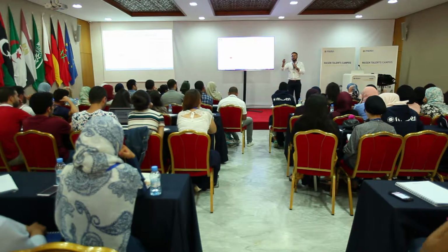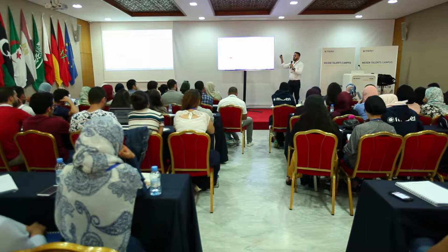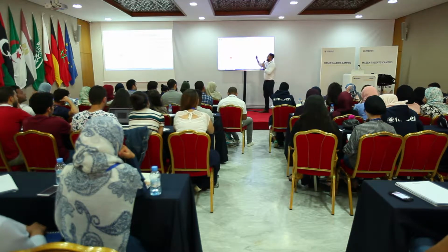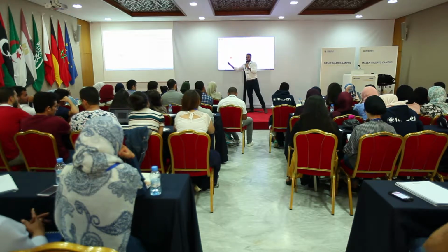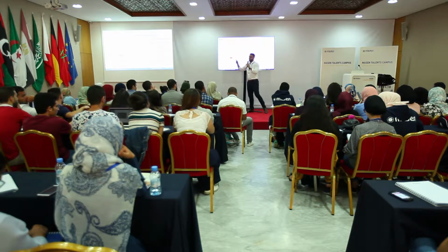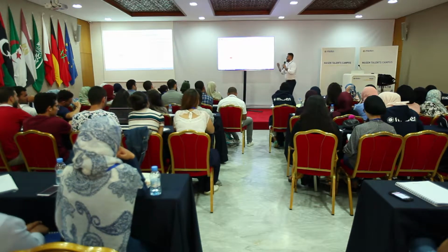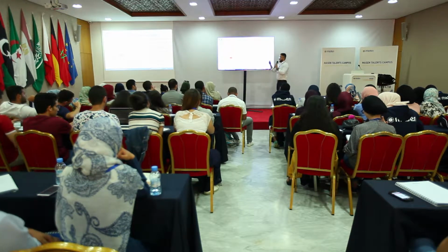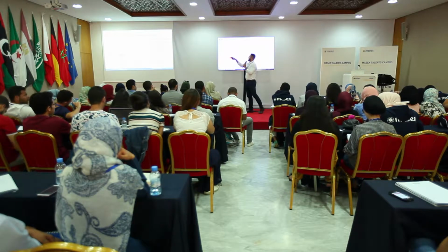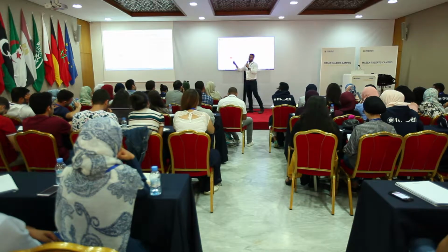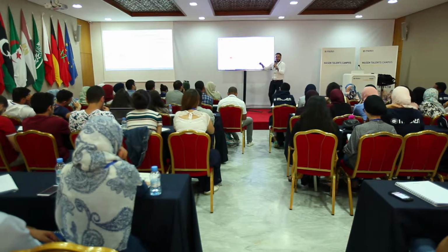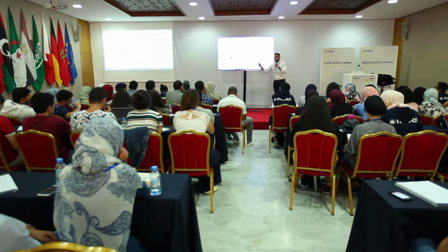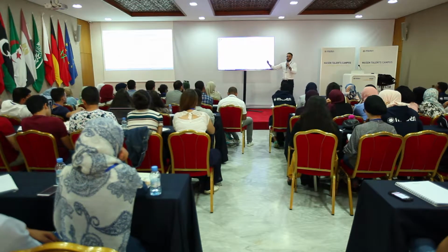Let's take the case of Morocco. The governmental agency here is Masen. So Masen will be like my green thing here, right? Masen has a role when it comes to promoting the projects, because Masen has to design the tender in which all the requirements for the plant are set up. Masen is saying, okay, I invite all of you power plant developers, companies, to build CSP plants, with a capacity from 100 to 150 megawatt, with a storage of at least 6 hours, and in this land area. So Masen takes care of that.